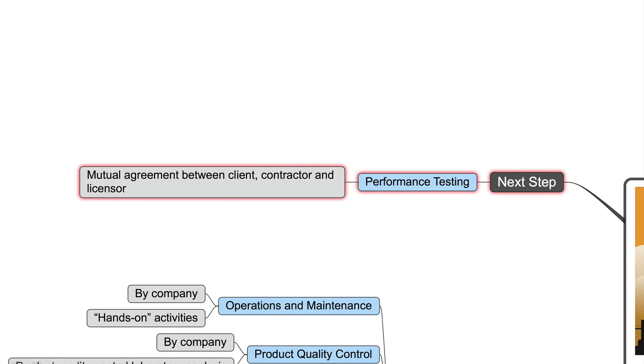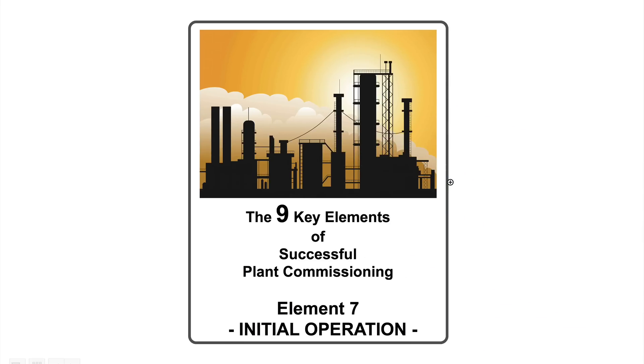Then, when this is really successfully finished, everybody says we are ready for the next step, the performance test. Then we can go further. But this has to be a mutual agreement between all involved parties, which means between the client, the contractor, and the licensor. Maybe the contractor thinks everything is ready and nice, but the licensor says no, we have a problem in this unit and with this process parameter. Then you cannot go further. It doesn't make sense. Each of the involved parties has to agree for our next step, the performance testing.